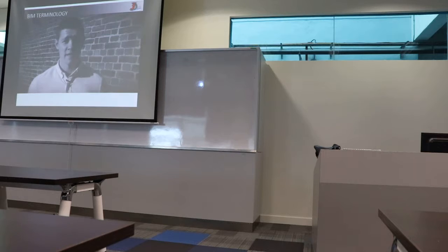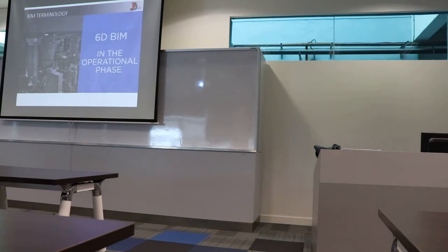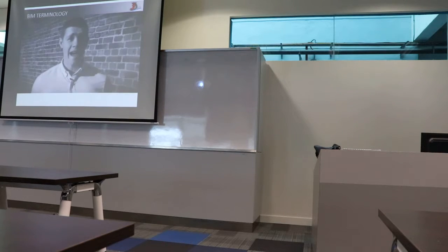In that all-consuming delivery phase we spoke about at the outset, it helps switch the focus from capital costs onto the whole life operating cost of the asset. The earlier you can do this in a project, the greater the value it will add. Ideally, you do it right from inception. That value is realised in supporting the operation of built assets once they're in use. At handover, the project team will be able to pass this complete data set, now known as an asset information model, over to the building's end user.